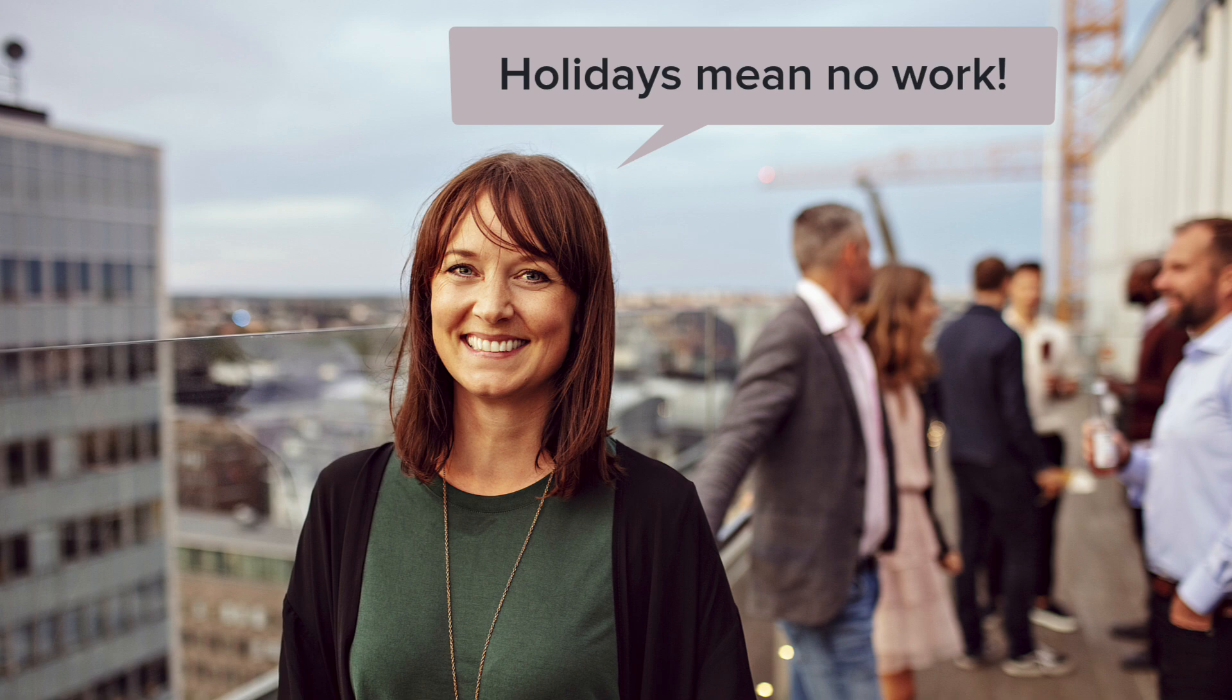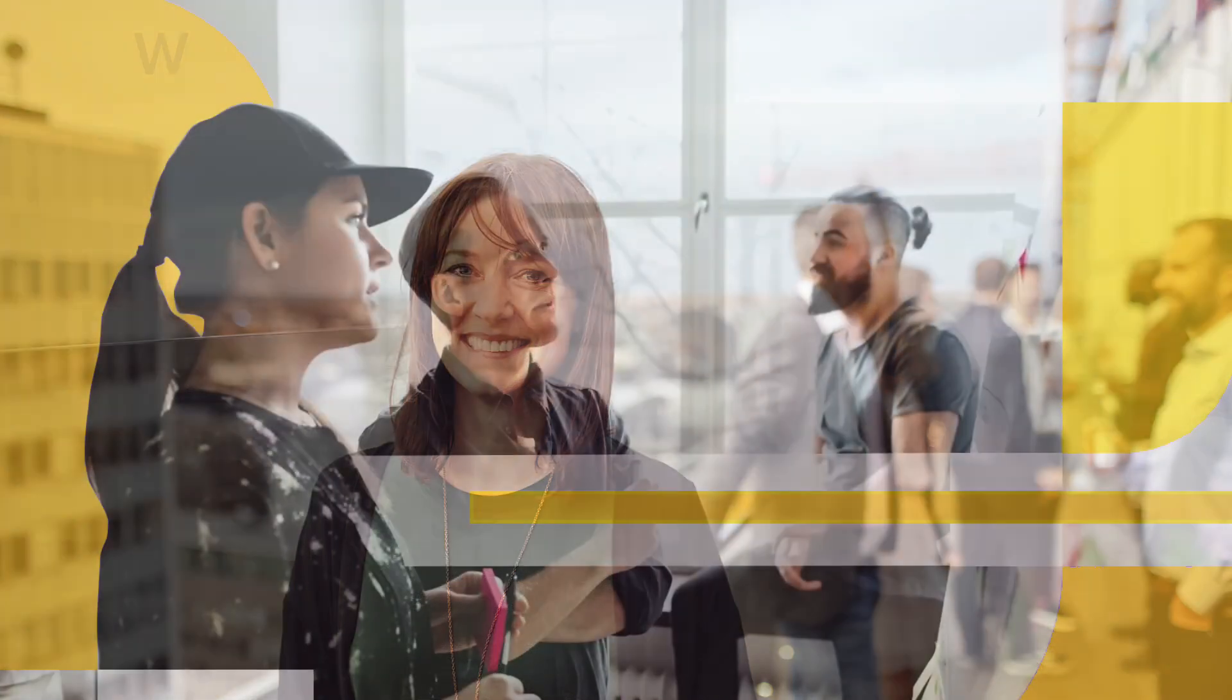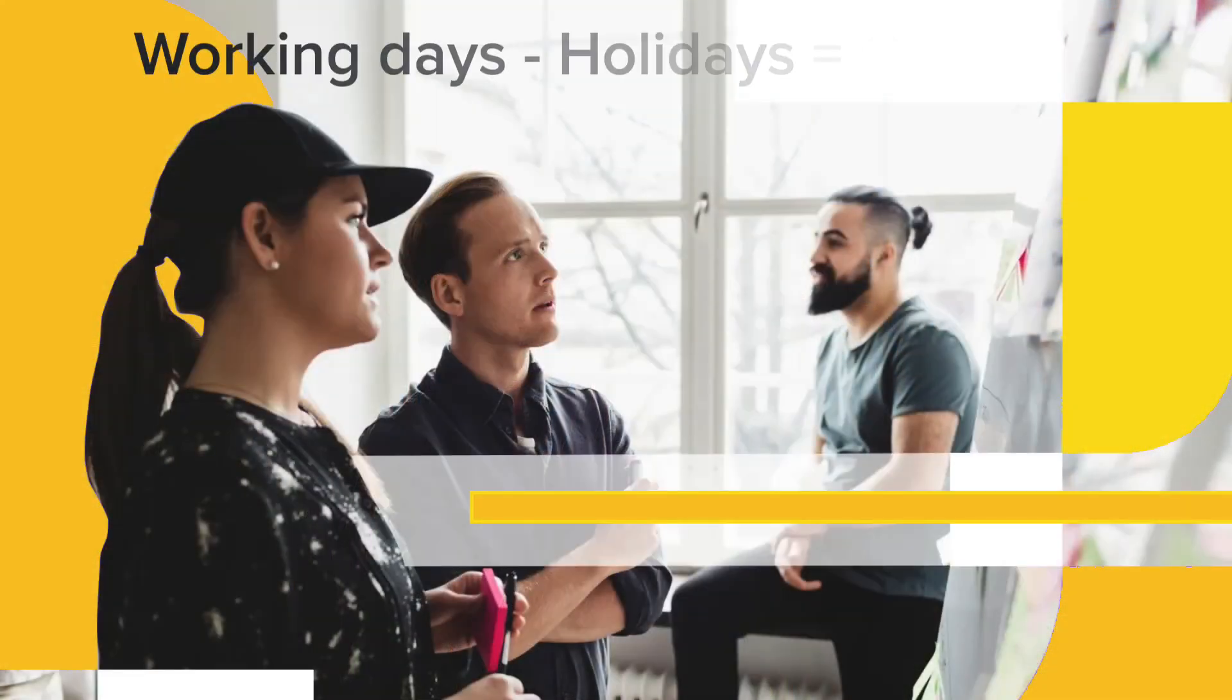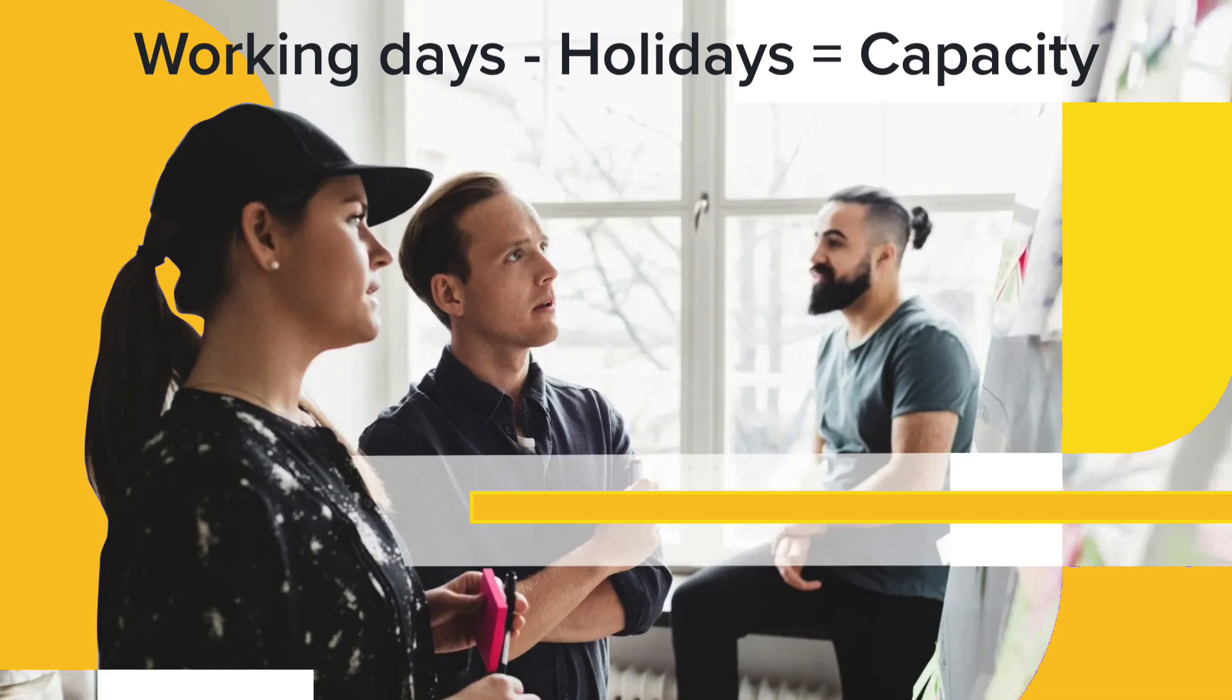They define the days where there is no work expected. Holiday hours are subtracted from the required working hours, so the resulting number of days is the working capacity for each employee.